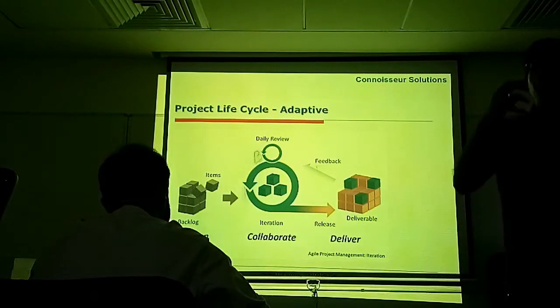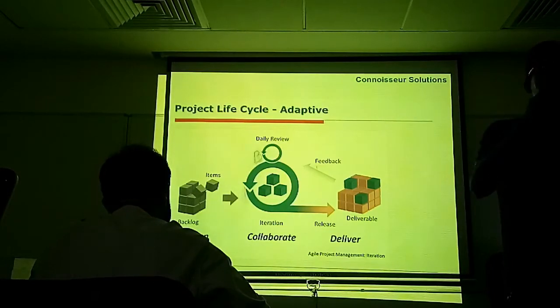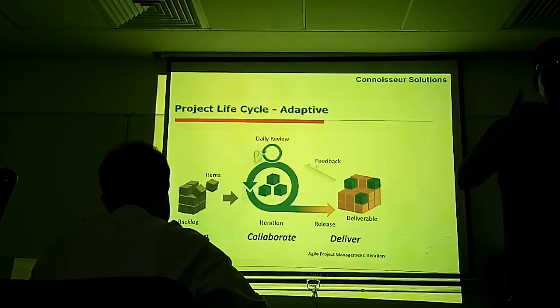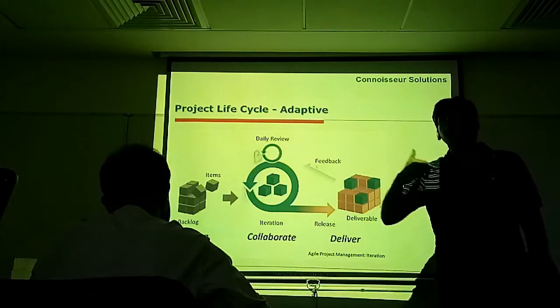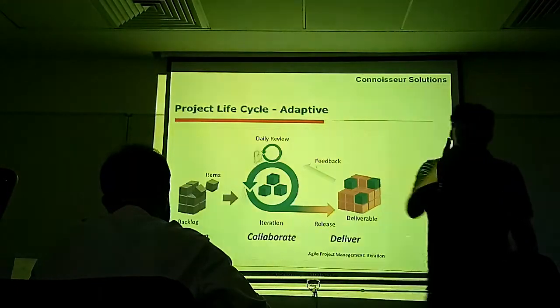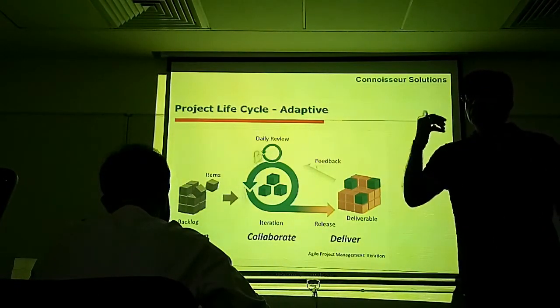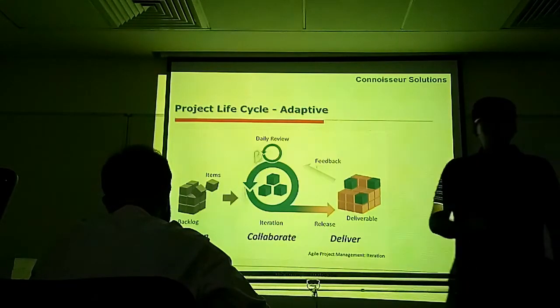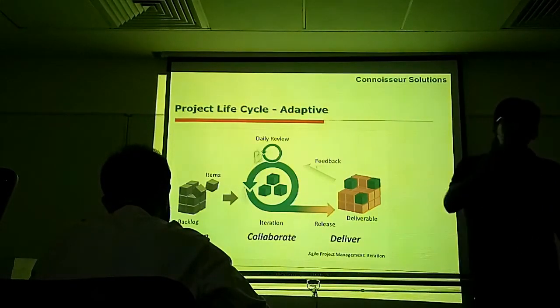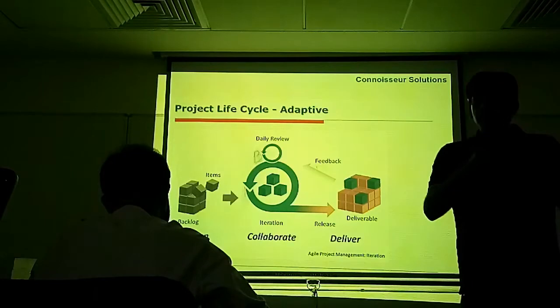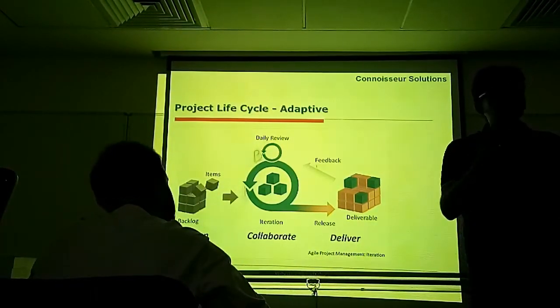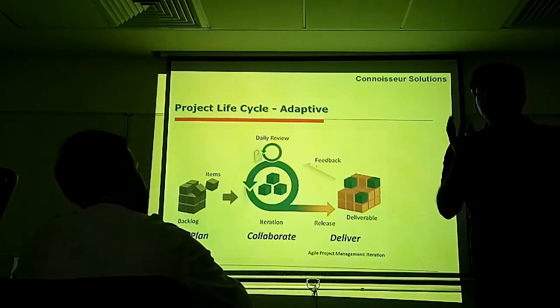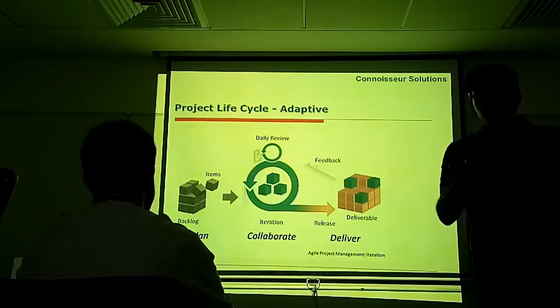And you will work very closely with the customer. At the end of every sprint, you will come out with a potentially shippable product. You might not release, you might release at the end of every phase. However, you will come out with a potentially shippable product at the end of every sprint. Which means every 2 to 4 weeks, you are showing a working deliverable to the customer.